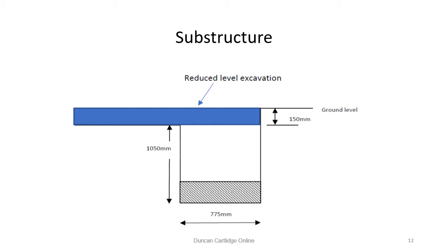Following any clearance of the site, the first task is to reduce levels as shown in blue on this page. Reducing levels is taken for the entire footprint of the building to the external faces of the foundations.